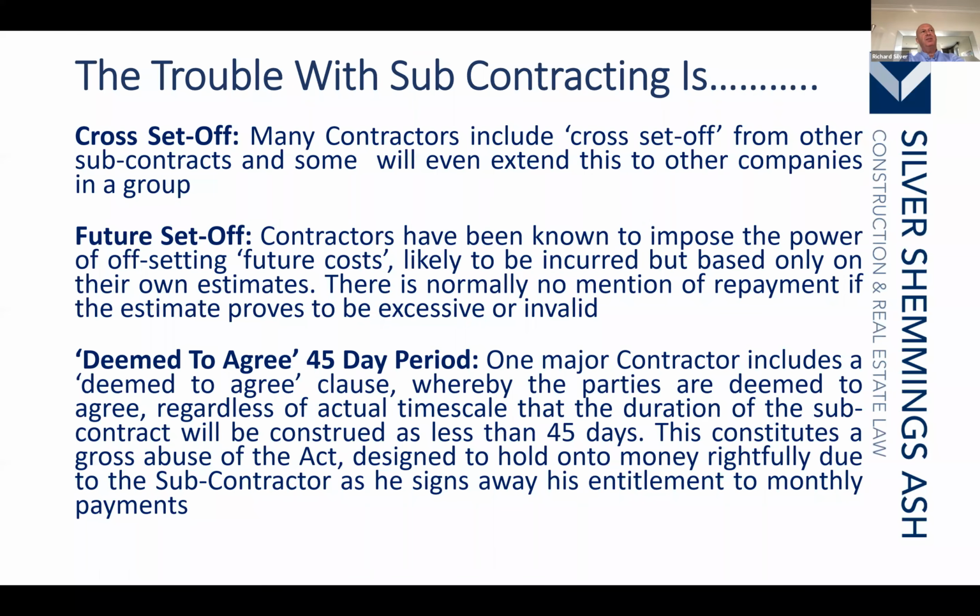So what quite often happens is that the contractor, and this equally applies to employers, they're uncertain as to how to put the contract together. And where they're uncertain, they think, oh, the easiest thing is to include every piece of documentation that's ever been produced and include it all in the subcontract or main contract. And all of these documents then have to be read, and it's a question of which one takes priority and can create tremendous uncertainty. Other contracts have a clause that provides that any previous tenders or documentation are excluded and overwritten by the contract. So in simple answer to the question, I don't know, it will depend upon the facts.